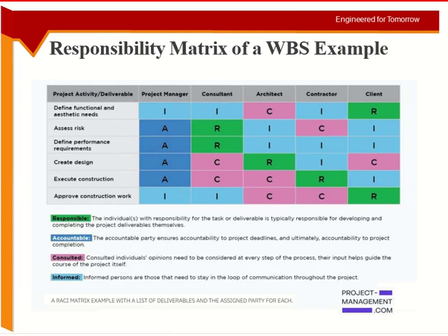That is because the responsibility goes to the client directly. So he will approve in the end. He's responsible. The activity is approval. So he will ask the architect, are you satisfied with the work? You will ask the contractor, are you satisfied with the payment and everything? Did you finish the job from your end? They both of them say yes. He will go to the site, have a look, approve everything, and then he will inform the client and the consultant and the manager that yes, I have approved everything. The project is from my end finished.